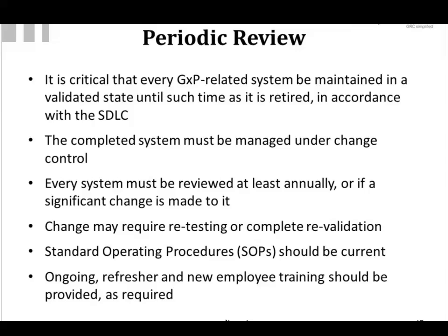Is it just a cosmetic change where you just have to verify that a header on a report name is changed correctly? Or is it something more complex with a software change, maybe new functionality? New functionality would require you to add something to your requirements document and then testing to be comparable to the requirement that's being asked. In either case, you're going to have to update your living documents to make sure they're current. So everything has to be done under change control.